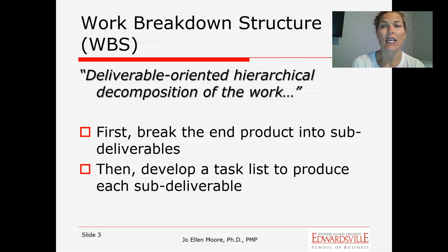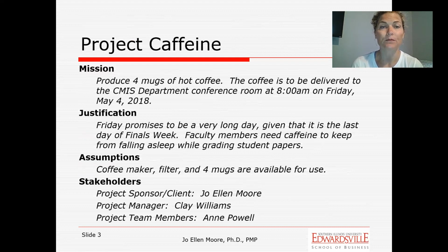It takes apart that final project into smaller, maybe more manageable tasks. So we'll identify these different sub-deliverables, is what they're referred to. And then for each sub-deliverable, we'll look at creating tasks that need to be done in order to get that sub-deliverable completed. Once all the sub-deliverables are completed, ideally, your overall task is completed as well.